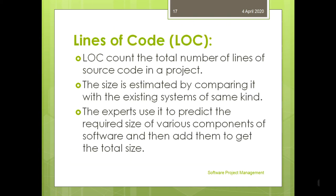Lines of code (LOC): as the name suggests, LOC counts the total number of lines of source code in a project. The size is estimated by comparing it with the existing system of the same kind. Experts use it to predict the required size of various components of software and then add them to get the total size. Advantages: it is universally accepted and used in many models like COCOMO; estimation is closer to the developer's perspective; and it is simple to use. Disadvantages: different programming languages contain different numbers of lines; no proper industry standard exists for this technique; and it is difficult to estimate the size using this technique in early stages of the project.